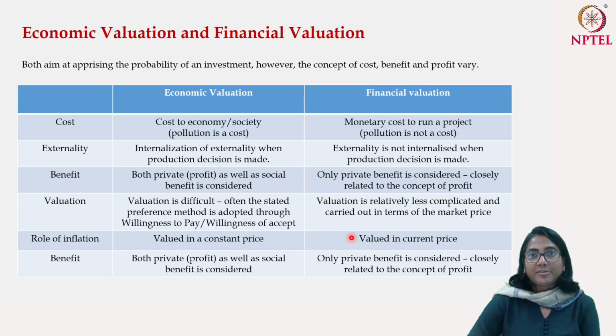However, in case of financial valuation, everything is calculated at a current price. So there is no role of inflation that is taken into account. In fact, in case of financial valuation, later we will see inflation is a kind of contingency that will be kept in when the financial valuation is pursued.